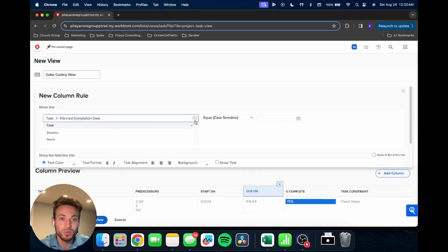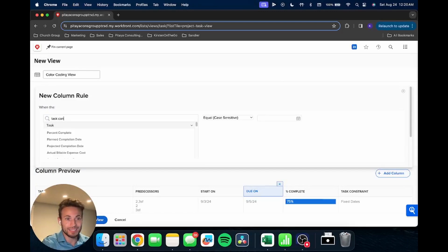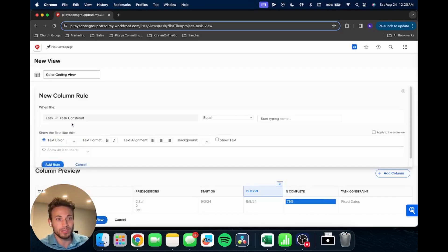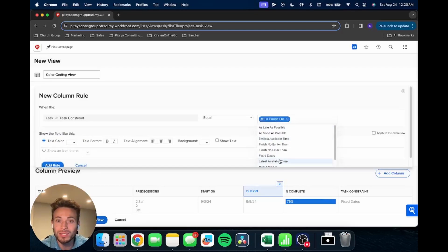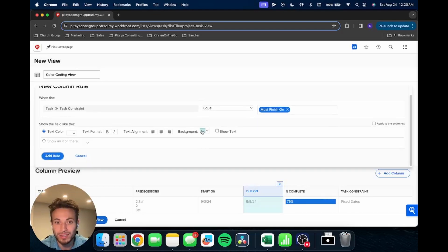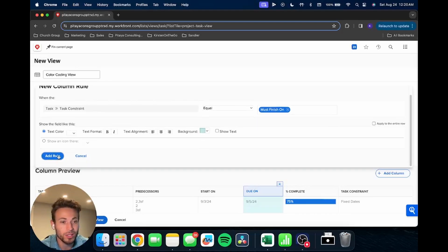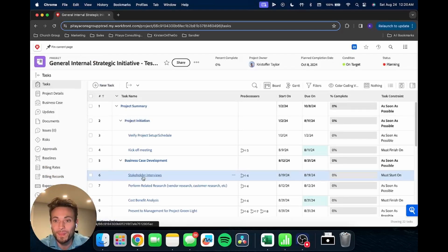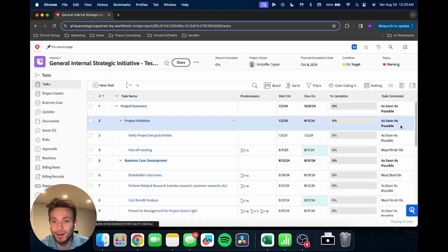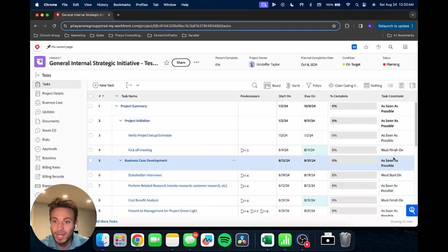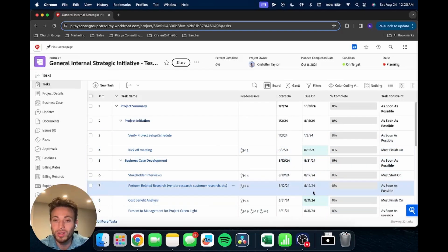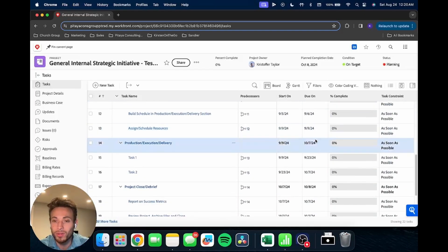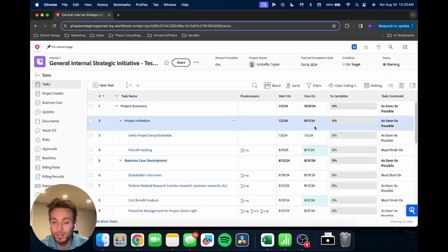Click there and add a rule for this column. Okay, so the first rule we're going to look at is going to be based off that task constraint. So we're going to say task constraint is equal to must finish on. And we're going to say it's going to be this kind of nice teal blue color. We'll add that rule, save that view. Okay. And now if we look over on our right-hand side, we can see the task constraint. You'll notice the ones that are must finish on are highlighted in blue, while all the other dates are just in the standard black with no background.